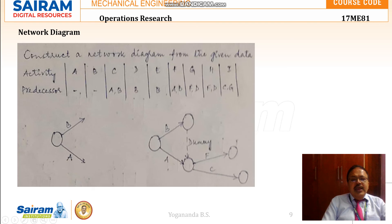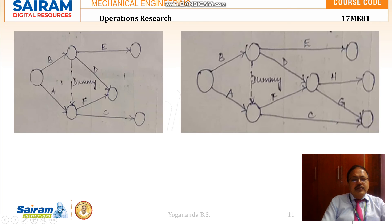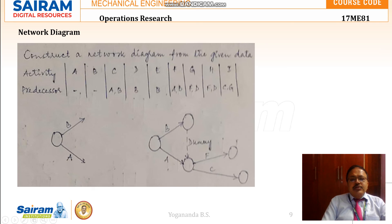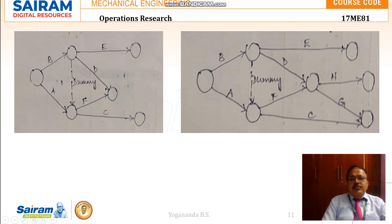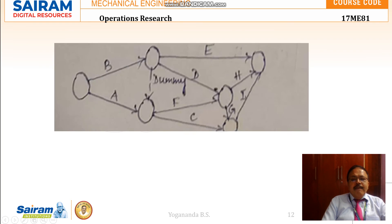For G and H, D and F are the predecessors. Once D and F are over, from that event we start the two activities G and H. For the last activity I, G and H are the predecessors. This is the diagram before completing the final diagram.